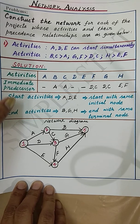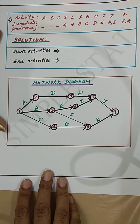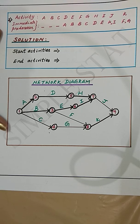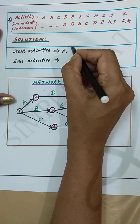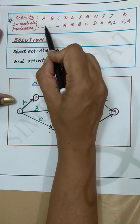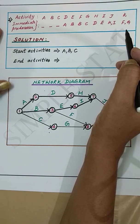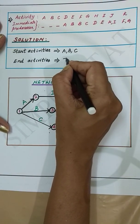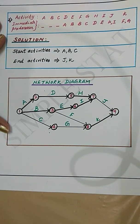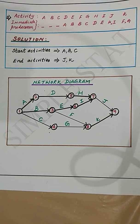Let's now proceed with the second problem. The start activities are A, B, and C — they start with the same initial node. The end activities are J and K, and they end with the same terminal node. Now draw the network diagram following the procedure used in the first problem and then number the events.